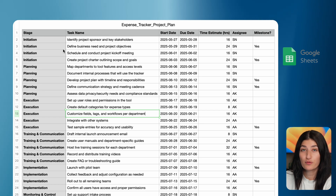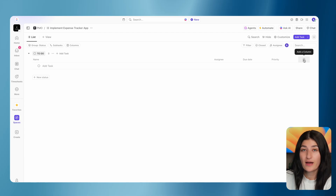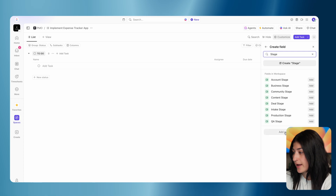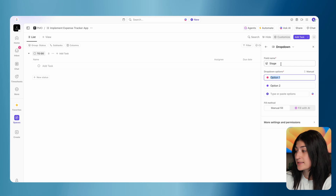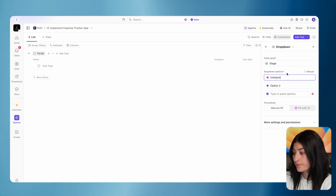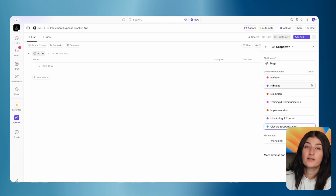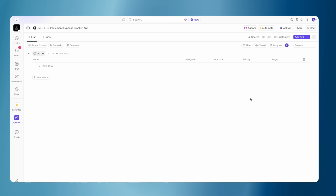The way that we're going to create these stages is by creating a custom dropdown field within ClickUp. I'm going to hit this plus sign to add a column and name it 'stage.' Let's go ahead and create this field. I'm creating my stage dropdown field, and for the options, this is where I'm going to put the different values for my stage. So we start with initiation, planning, execution, training and communication. I have all of my stages listed out under this field, and I'm going to go ahead and create.